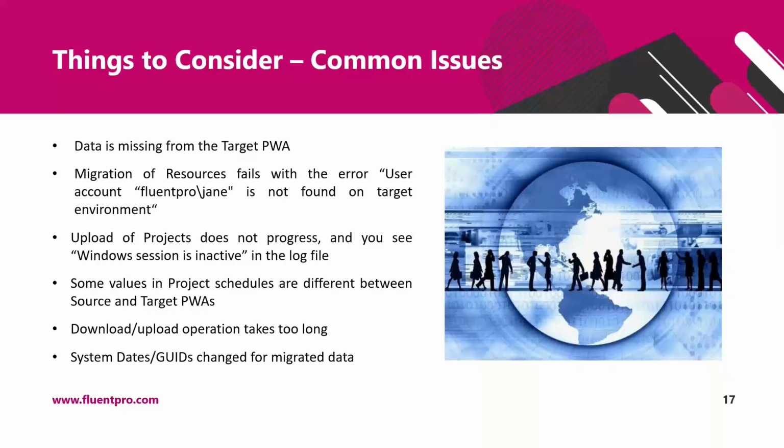Another reason is that the upload of data was performed in the incorrect order. For example, the case that I just described, if portfolio analysis was uploaded before all projects were uploaded into the PWA. In this case, when you open a portfolio analysis, you will see that parts of the data are missing.